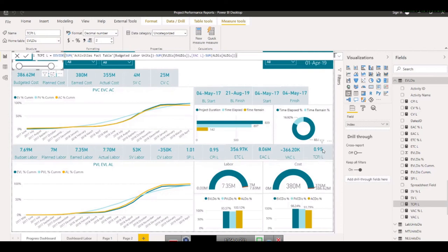It is saying that we need to be 5% more productive, we need to save in fact 5% of our labor in the remaining scope of work. What is the remaining scope? The remaining scope is our planned value, sorry, not planned value. So far planned value is this, we need budget minus this, which is the estimate to complete. In the remaining work we need to save 5% of productivity, so that we will reach here, and it is telling us that the negative value is the amount by which we are going to overrun.